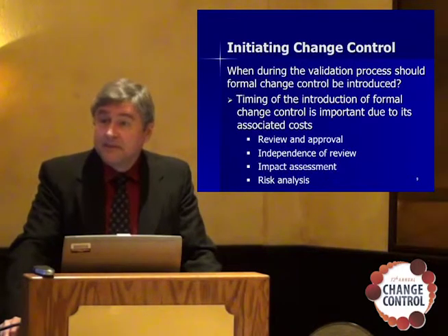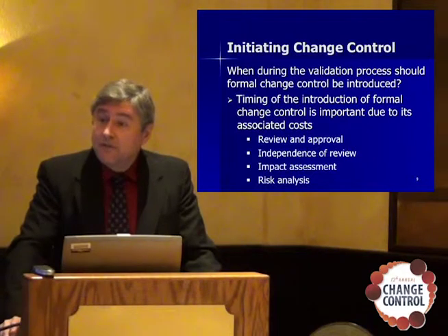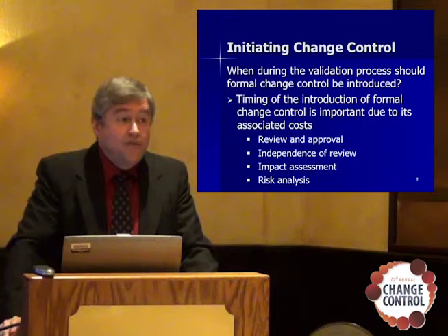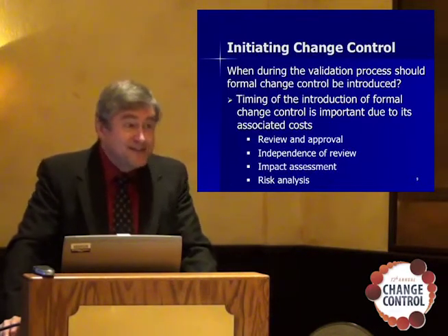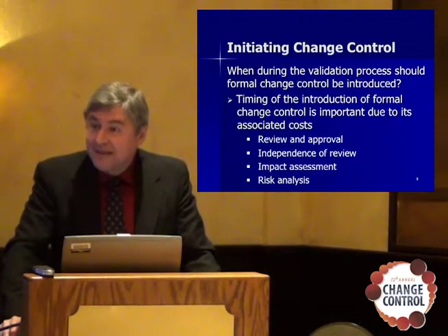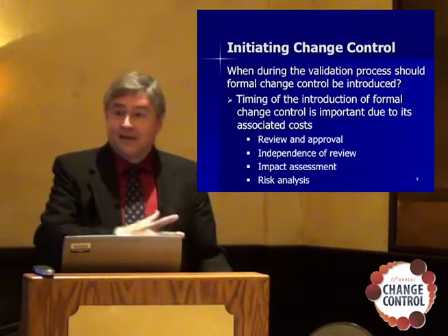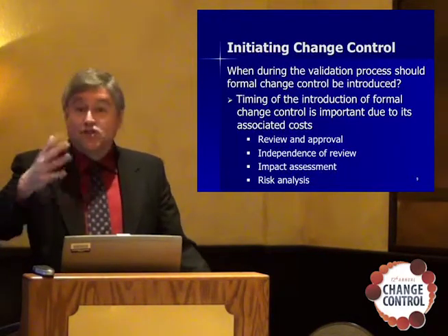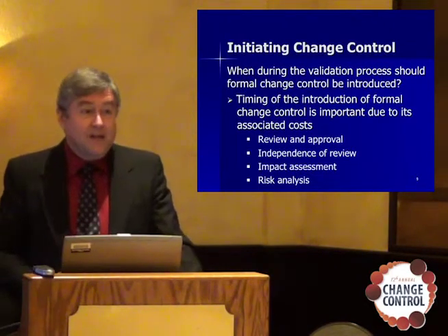Impact assessments. We've talked about them. They are not free. They take time to do, especially if you're going to do one correctly. If you're at the very beginning of a software project where you're just figuring out your requirements, you don't want to do an impact assessment of every little change because your requirements are changing so rapidly at that point. Oh, let's get rid of this whole chunk of requirements. Let's add this whole chunk. Let's change this so that we can have our colleagues in Japan use the system as well. We're going to have to do some Japanese interface or something like that.